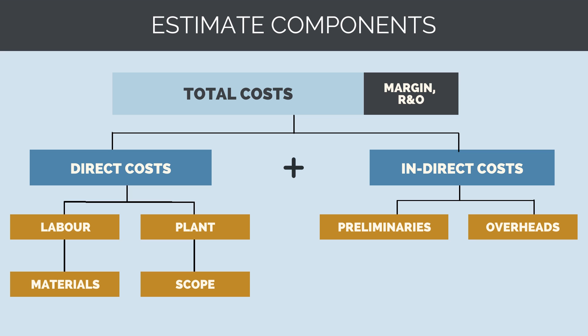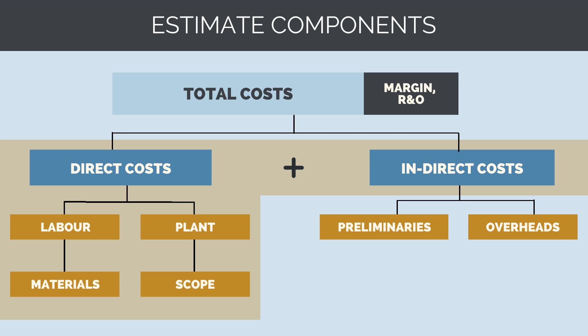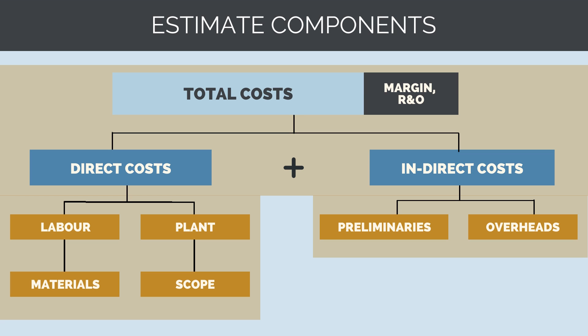A project's total costs are made up of direct and indirect costs. To calculate direct costs, we need to work out the labour, plant, material and subcontract costs it will take to complete all the construction deliverables. Indirect costs are all the other things we'll need in place to ensure the works get done, like management staff, site huts, security fencing and so on. Combine these together and we get our total project costs, to which we can add our risk and opportunity, margin and corporate overheads to get the price submitted to the client.